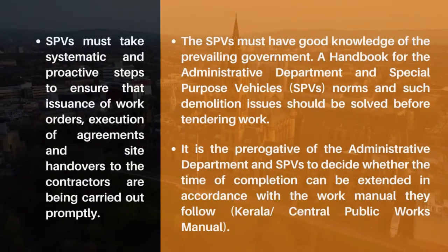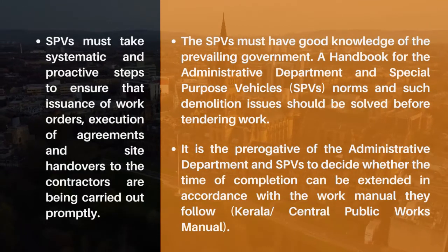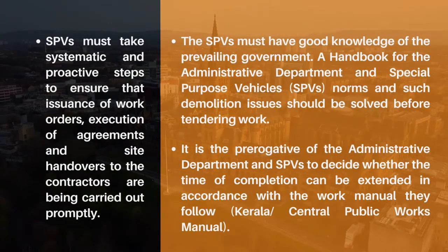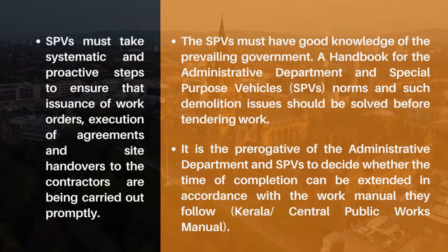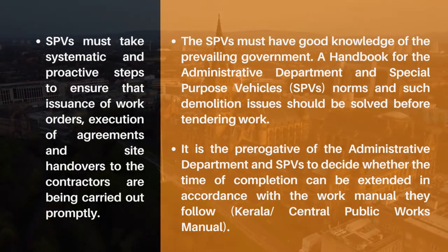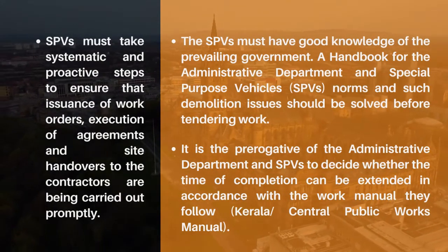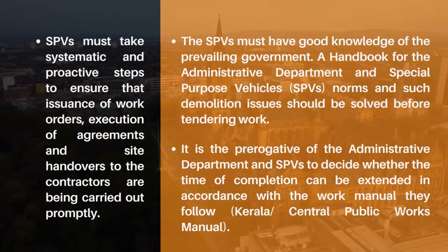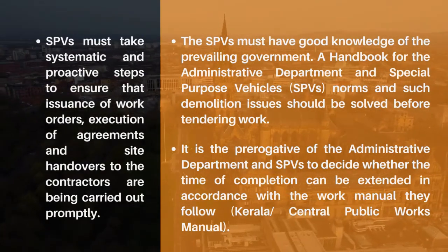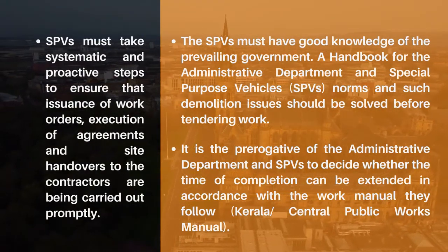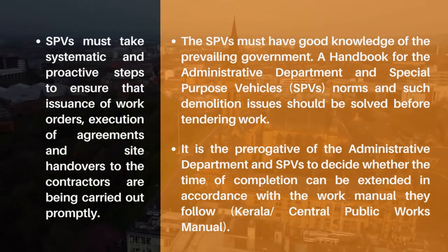SPVs must take systematic and proactive steps to ensure that issuance of work orders, execution of agreements, and site handovers to the contractors are carried out promptly. The SPVs must have good knowledge of the prevailing government handbook for the administrative department and the SPV norms, and such demolition issues should be solved before the tendering work.